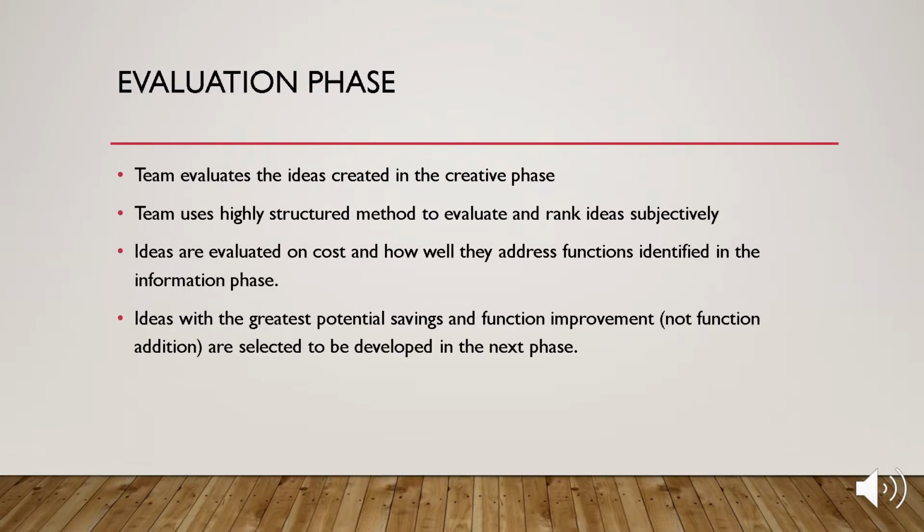Now, once you've completed the creative phase, you can move on to the evaluation phase. In the evaluation phase, the team evaluates the ideas created in the creative phase. To do that, the team uses a highly structured method to evaluate and rank the ideas subjectively. The ideas are evaluated on cost and how well they address the functions identified in the information phase. The ideas with the greatest potential savings and function improvement, remember, not function addition, are selected to be developed in the next phase. Now, to evaluate subjectively, again, you need to use a comparative method to evaluate value.